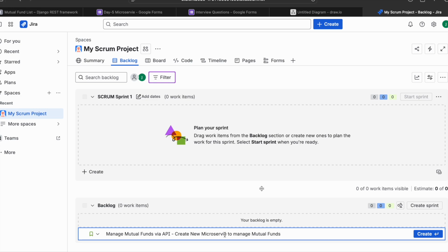This will take at least one or two sprints setting up the microservice, so you have to create a developer task or user story for setting up the microservice structure. Once you create it, you can use Swagger to try it out. When you ping the health check of the microservice, you'll get an okay 200 response, right?